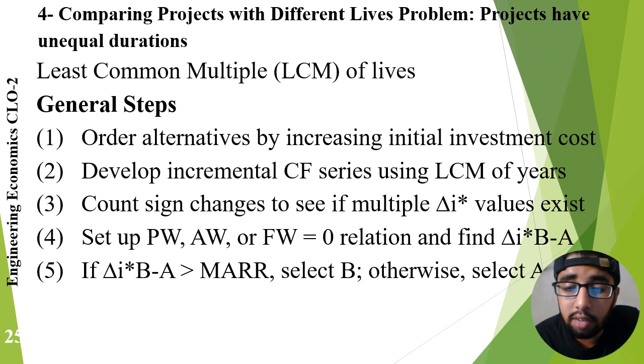Comparing projects with different lives. A common challenge in engineering economics occurs when projects have different useful lives. Direct comparison may lead to misleading conclusions. To solve this problem, we use methods such as LCM or annual worth analysis. This method creates a fair basis for comparison. In project management, decision makers frequently encounter alternatives with different service lives. Therefore, understanding how to compare such projects is essential for deciding the most economical option.